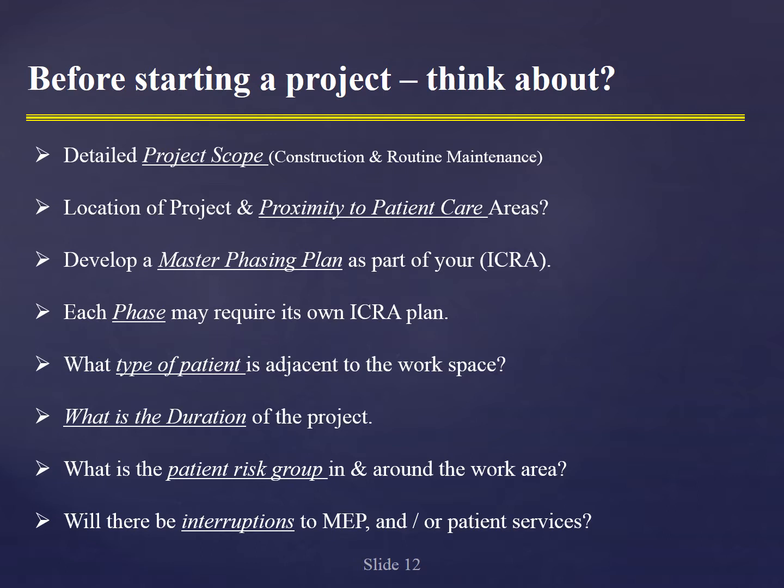I know that we tend to want to do one comprehensive ICRA. I absolutely felt that way, and you try to do it if you could. But lots of times you just couldn't do it. The projects were just too specific. Or maybe one piece of the project was so ICRA intensive that you didn't want to have to apply that intensity throughout the project. So in some respects, it can actually help you not have to put in such intense ICRA if only one piece of it is going to be intense, thus saving you some time and money.